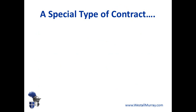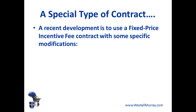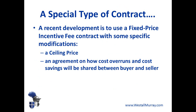One emerging favourite type of contract is something called a fixed price incentive fee contract with some specific modifications. Firstly, a ceiling price will be set. And secondly, even though it's fixed price, it's based on a fair estimate of how much the vendor will incur in costs to do the work. It is just an estimate, so the costs might be different. Typically, the buyer and seller agree how cost overruns and underruns will be handled — and we'll see this in practice in just a moment.